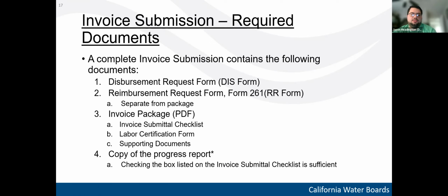So just to summarize, you can include the progress report in your invoice submission if you want to. However, if you're doing it separately, both of these items should be uploaded to FAAST. Just make sure that your progress report has been approved and uploaded to FAAST prior to invoice submission.